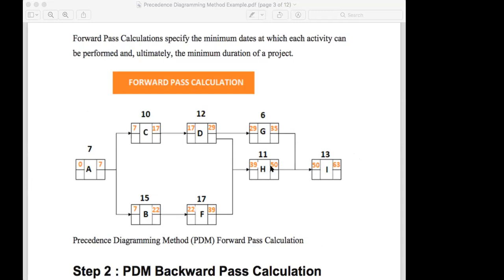This is not finished now. Without finishing this one, you can't start this one. But if you put 50 here, by that time this is already finished. That is the 35th day, it was already finished. So you have to wait until this is finished. So if you put 50, that is good. Then 30, 60, it is finishing on the 63rd day.